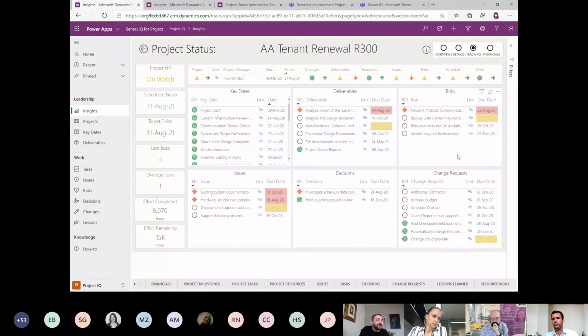We might want to leverage more people to help speed it up, or switch out resources if we've got stuck. It might be a customer problem where they've got stuck internally. So I'd probably get on the front foot with the PM to work through resolving these sorts of issues, and then probably a replan just to make sure that our resource forecasting was correct.